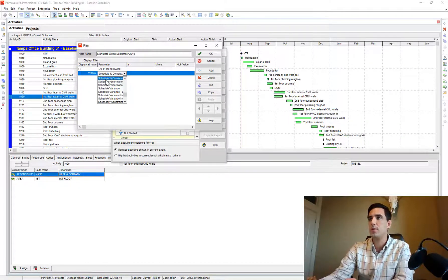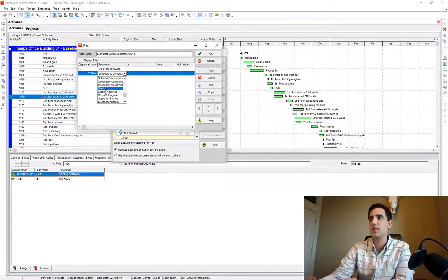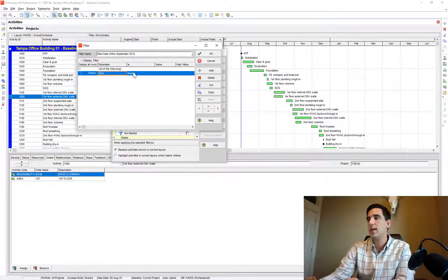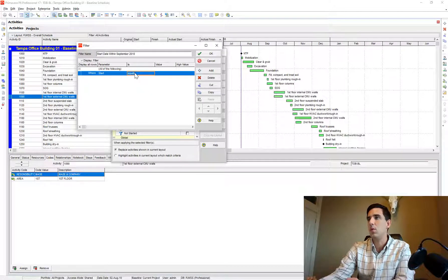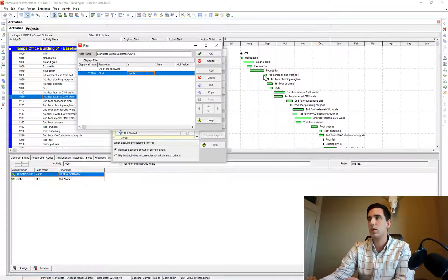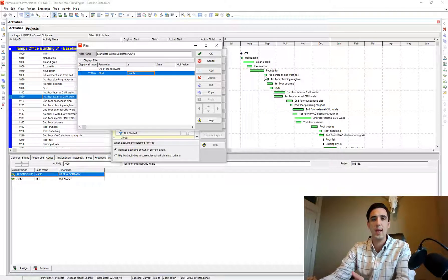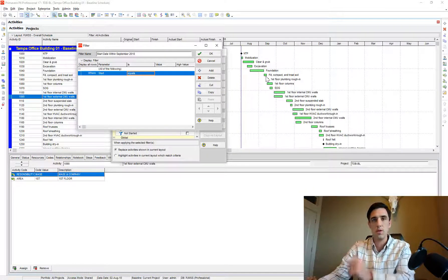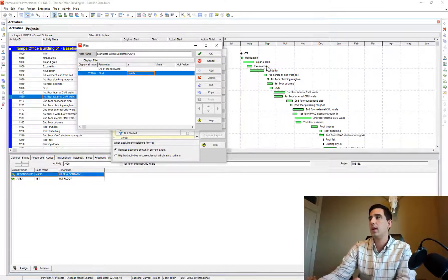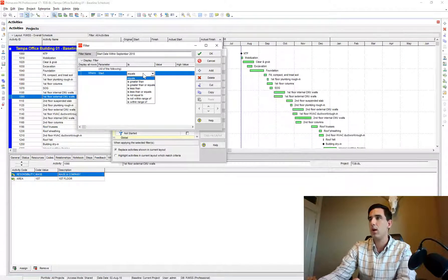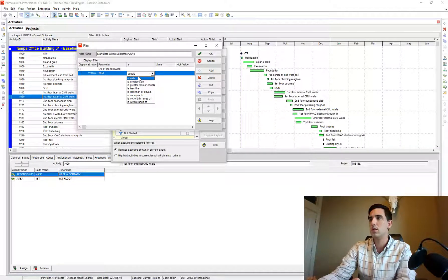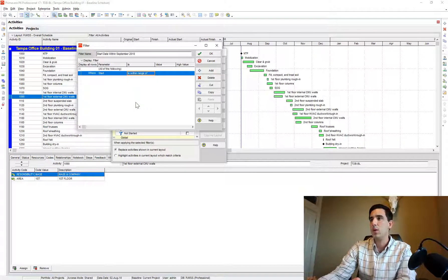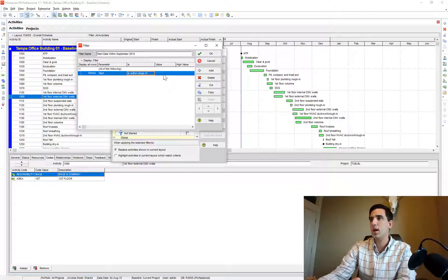You can either scroll down or I just tap S on my keyboard and that jumps me to the S section. I'll find the start, and instead of 'equal' - because I don't want it to be equal because that's just going to return one date, you know, equal to September 6th, it's just going to return any activity with that exact date - so what I want to use is the drop-down and I want to say 'is within range of.'